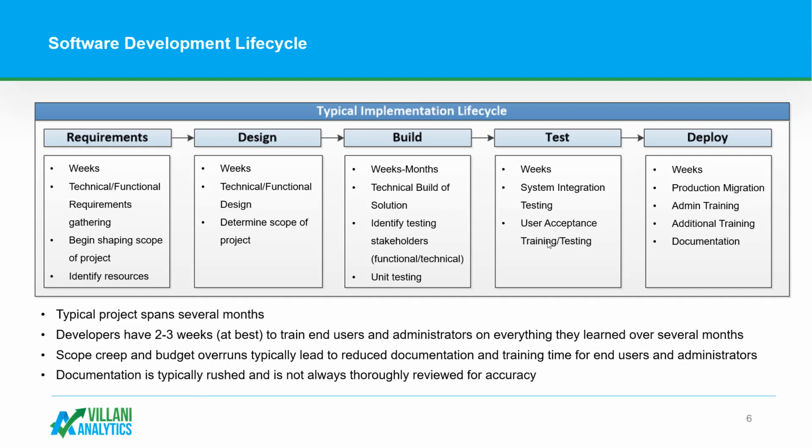And as we look through the typical implementation lifecycle, a lot of projects that start up are doomed in some regards, just because when you look at the life cycle, you have your requirements, your design, your build, testing, and deployment. Many of the functionality components aren't actually fully tested until you get to the testing phase. Some organizations try to do an agile approach to implementations, and the part that gets done agile is your requirements, design, and build.